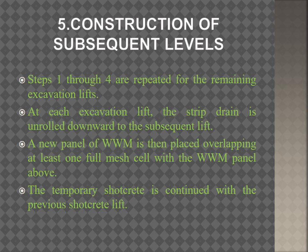Step five is construction of subsequent levels. Steps one to four are repeated for the remaining excavation lifts. At each excavation lift, the strip drain is unrolled downward to the subsequent lift. A new panel of welded wire mesh (WWM) is then placed, overlapping at least one full mesh cell with the panel above, and the temporary shotcrete is continued with the previous shotcrete lift.